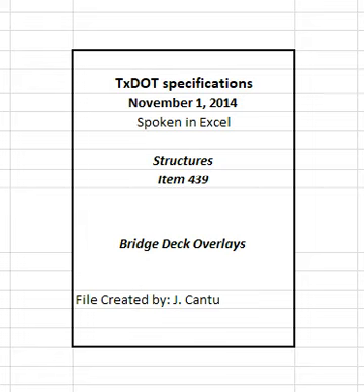For construction of concrete or latex modified concrete overlays. 4.1 General. Provide for approval a detailed work plan including equipment and manpower before beginning any work. The engineer will inform the contractor if night placements become necessary. No additional compensation will be provided for night placements of concrete. Provide sufficient lighting to make quality workmanship and adequate inspection possible during night placements. Lighting must be approved before operations begin.